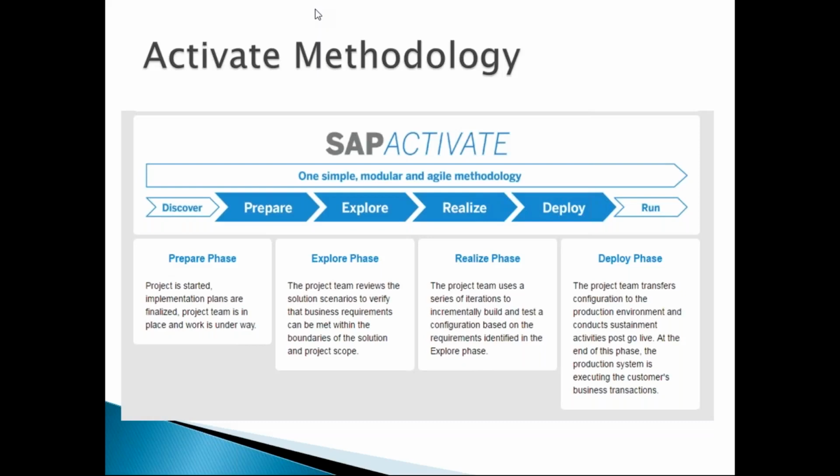of 20 weeks for implementing this project, the complete 20 weeks we don't sit on the configurations. In the normal other traditional approaches, almost 16 weeks they sit on the configurations, and sometime in the 16th or 17th week we go in front of the customer trying to demonstrate the product to them, and then any changes they are saying, any issues that they are identifying there, then we have to fix it. We are required to do the training, testing, all that in the last place.